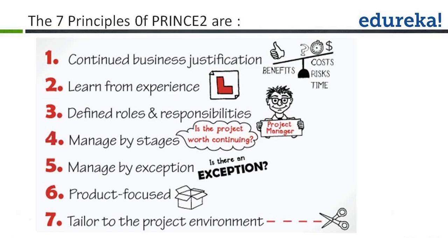At the end of each stage, we have a stage end assessment to evaluate actual achievement against the planned targets. This gives the true picture of project progress and reduces the project risk by timely responding to the uncertainties and taking quick corrective actions for the issues. Before proceeding to the next stage, the business case is reviewed to determine whether the project continues to have a business justification or not.